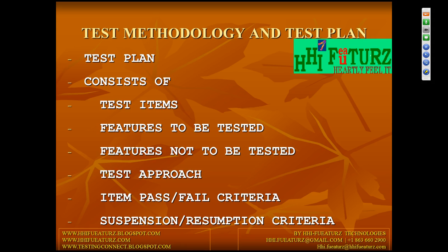This is important: when you will stop your testing and when you can restart your testing. At a very high level, you can stop testing when your application meets the customer's expected quality. It's not possible to deliver 100% quality of the application, so if 98% of the application gets accepted, at that time you can stop your testing and release it to the customer. At that time you can suspend.